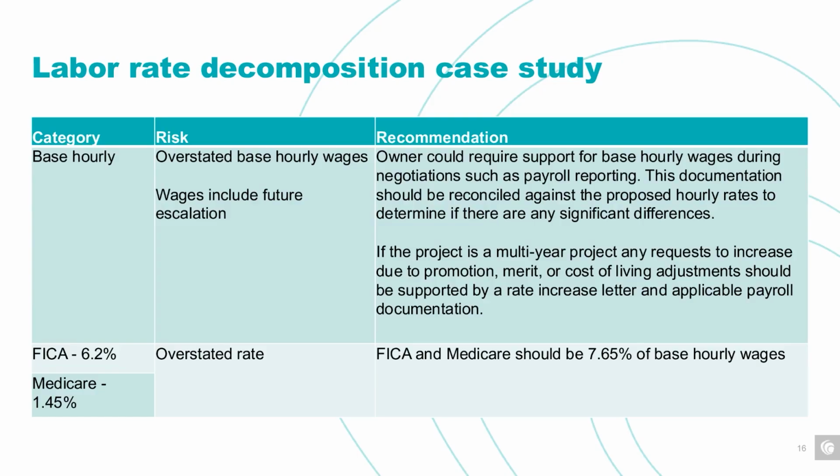One thing that's important here is you're always going to want to look at how these rates are adjusted for overtime, specifically for your hourly employees. If you see the aggregate proposed rates increase by 1.5 times the rate for overtime or 2 times the proposed rate for double time, this is going to be an immediate red flag. So in most instances, the components of labor burden only apply to the straight time rate and therefore should not be calculated and considered in the premium time rates.